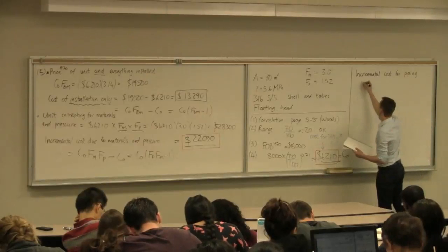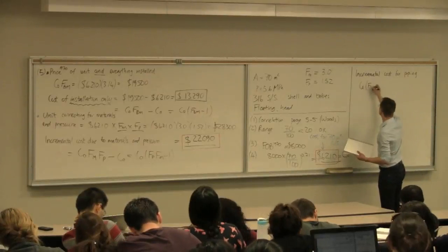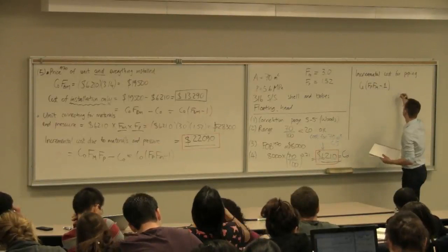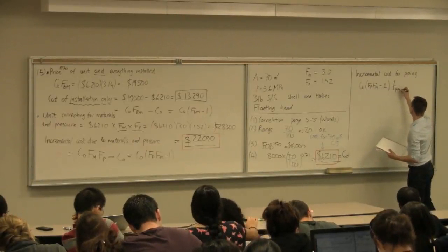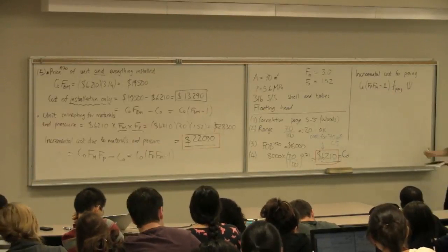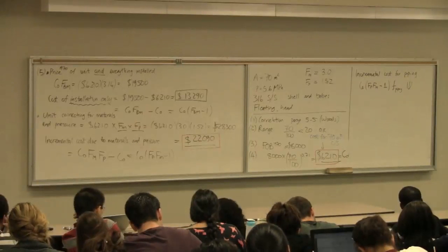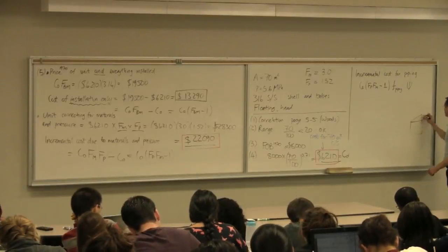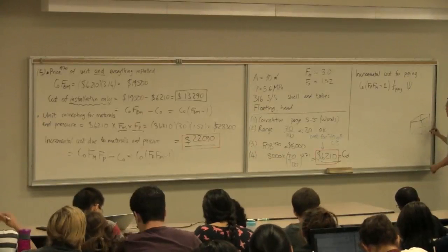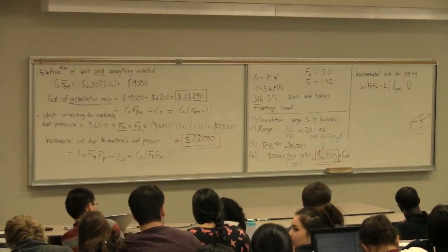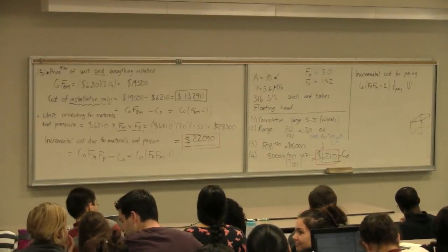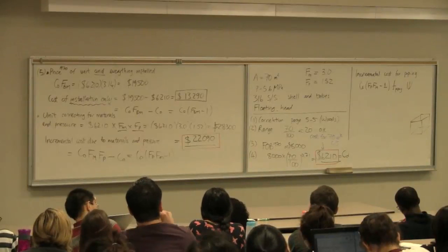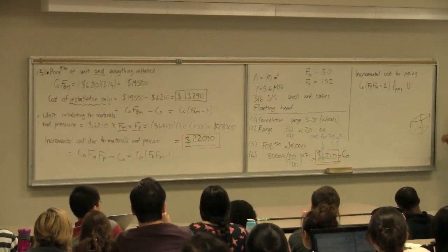And the formula for it is to take your base case C0, multiplied by the factor for pressure, multiplied by the factor for materials, minus 1, then multiply by the piping factor, then multiply by another final factor, psi. And psi just says, if we take our bare module, which is a 3 meter by 3 meter area around that heat exchanger, we can say, well, are we going to change 100% of the piping in the bare module, or 70% or 80%? What fraction of the piping inside the bare module needs to also be changed from carbon steel up to stainless steel?